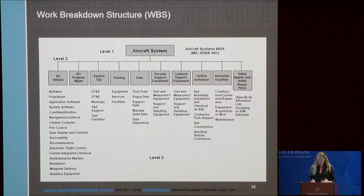This becomes a basis for the project EVM metrics and is used to track the actuals versus the estimates for cost and schedule. So in order for EVM to provide value to the project manager on the status of their project, the method to determine work package progress also needs to be determined during project planning, with clear parameters and requirements for declaring progress or credit. When are we done, quote unquote? There are many methods, including assessing the number of units completed, setting incremental milestones, start to finish, which is either I'm 0% or 100%, there's no partial credit, level of effort tasks, or individual or subject matter judgment.